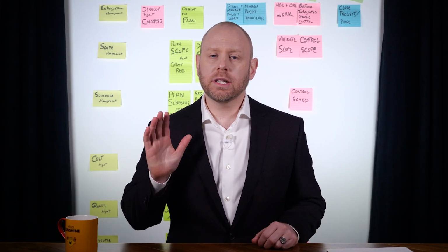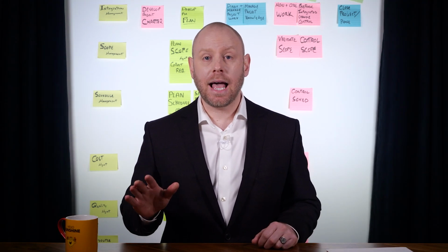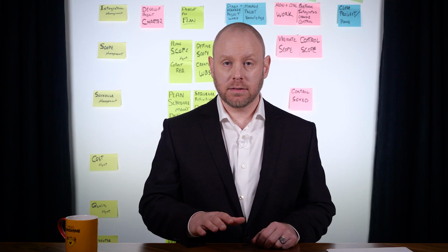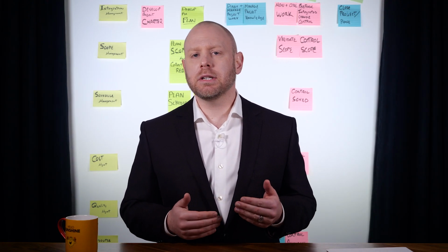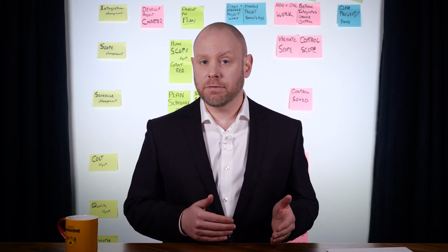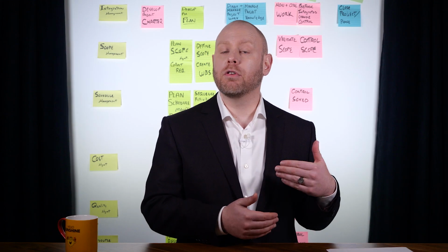A fallback or contingency plan can be developed as an implemented risk response. In this case, secondary risks should be identified resulting from the implementation of the risk response.